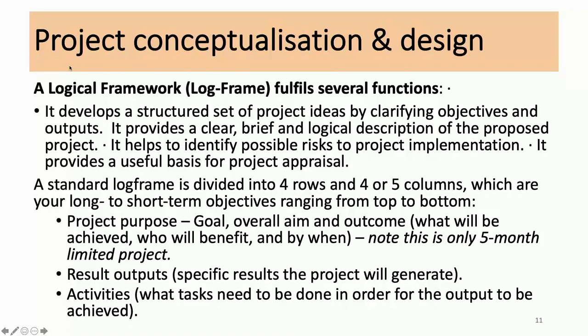A standard log frame is divided into 4 rows and 4 or 5 columns, which are your long to short-term objectives ranging from the top to the bottom. For this project, we use a very simplified log frame. But you need to start thinking to complete the simplified log frame. You still need to think on the overall, starting with the project purpose, the overall aim and outcome.